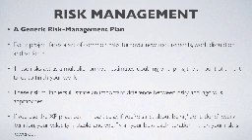Every project faces a set of common risks such as turnover, new requirements, work disruption, and so forth. These risks act as multipliers in your estimates, doubling or tripling the amount of time it takes to finish your work. These risk multipliers illustrate an important difference between risky and rigorous approaches.